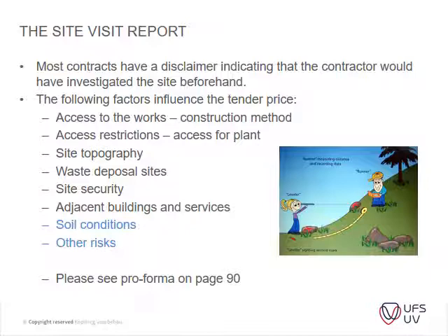So you need to look at the following items. Your access to the site, or do you have accessibility to the site? If you've got a junior person that might visit the site, you won't necessarily look at those items, whether access to site might be a challenge. Access restrictions: will plant actually be able to get into the site, or do you have to get a crane to lift the plant into the site, which will add a lot of cost to your project? How does the topography look? Is it quite a slopey site?